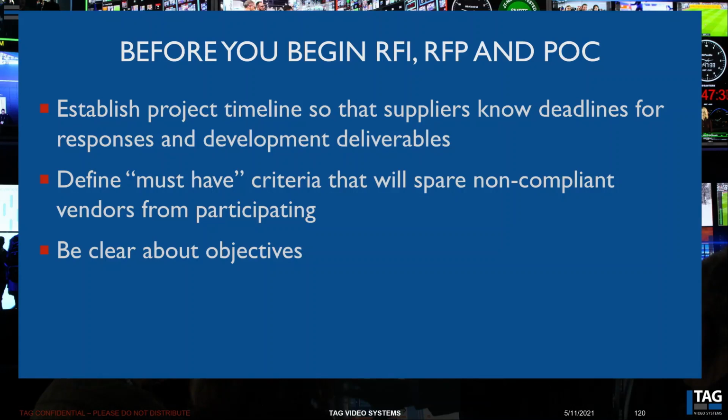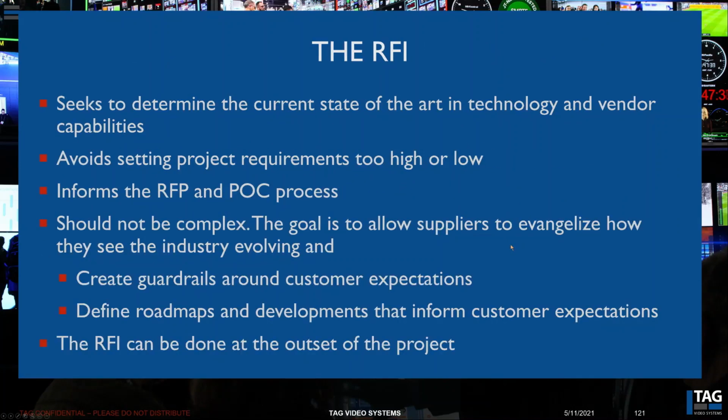And be clear about your own objectives. Really understand those tests and make sure that they're meaningful to your business objectives. So we talk about the RFI, and it really seeks to determine the current state of the art in technology and vendor capabilities. And it helps you avoid setting your project requirements too high or too low. I have seen customers who put out RFPs for projects that nobody can meet, or maybe only one vendor can meet, and they know only one vendor can meet that, and they're therefore going to be stuck with that one vendor and whatever that vendor wants to charge them.